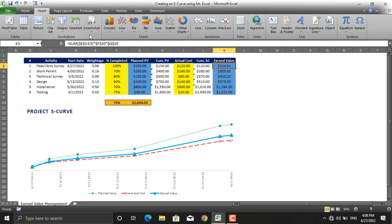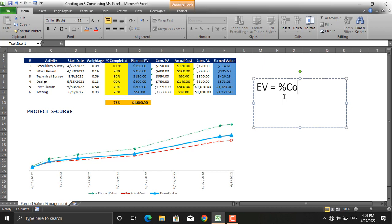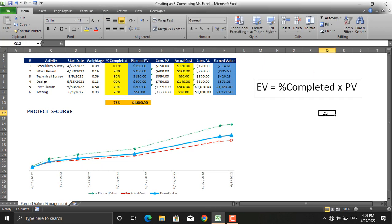Formula for earned value, the formula is, let me write it down here for you: EV = %Completed × PV. This is the formula for earned value.